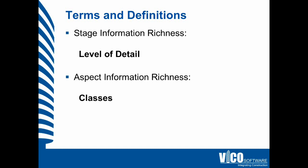The information richness that is targeted per building element category in each of the stages is the level of detail, also referred to as level of development. And the information richness for each of the aspects is referred to as classes — so a class 2 model, a class 3 estimate, and a class 4 schedule.